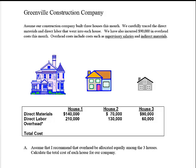Part A: assume that I, as CEO, tell my three project managers that I'm going to allocate overhead equally between the three houses. If I'm going to split the overhead equally, there's $90,000 of overhead and there are three houses, so $90,000 divided by three is $30,000 per house.